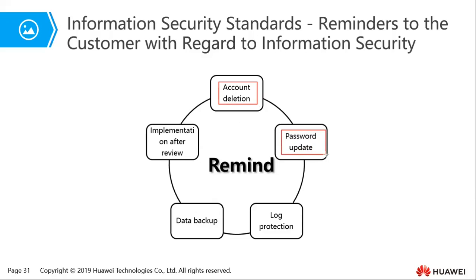You need to remind them to update their passwords for the accounts that they're now going to use going forward, which you handed over to them. So they need to change the passwords. Then they also need to protect the system log. They need to perform data backup regularly, and implementation after review. There are some things they're also supposed to implement after the handover of the project. So you need to remind the customer to do all this.